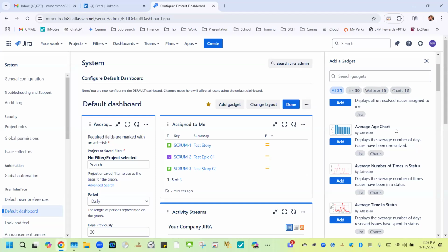That way we give ourselves a week to make any adjustments before we release that code. And we're going to run our sprints about every 2-3 weeks, really centered around that client demo, updating things based on the client's preferences before we roll out code. So what that should tell us is that in theory, on average, the stories that are raised should be anywhere between about 2 to 3 weeks old.